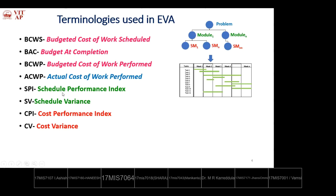Schedule Performance Index (SPI) is used to assess the progress of all tasks — whether each task started and finished by the given deadlines. Schedule Variance (SV) accounts for dependency among activities or the presence of critical activities and schedule changes, measuring the difference between the planned and actual schedule. Cost Performance Index (CPI) estimates the cost of all delayed tasks alongside normal project products.